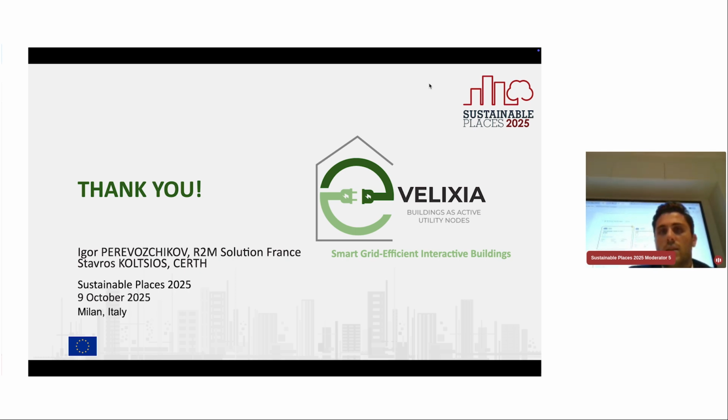So in order to estimate the cost, we calculate how many times we have to install this kind of equipment. So for a heat generator control for heat pumps, let's say our building has 2 heat pumps. So we have taken this information from the BIM file.